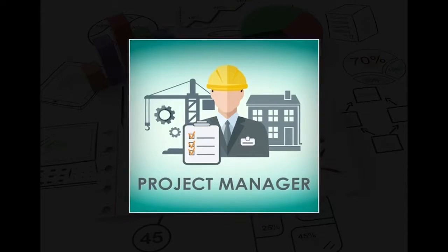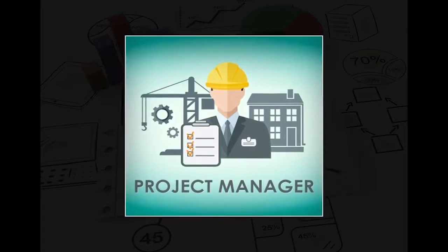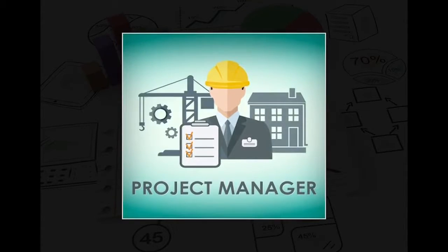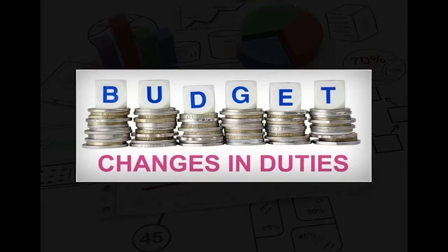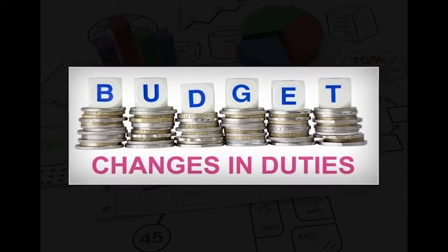It is important that the project manager understands the donor contract clauses and monitors with special attention the accounts or the budget items that have restrictions. Not doing so may result in losses to the project and the organization. Other types of changes come from causes external to the project that may limit the activities or work it needs to perform. Approved changes to the budget will need to be reflected in the accounting system used by the organization, and new project budget reports will need to reflect this change.